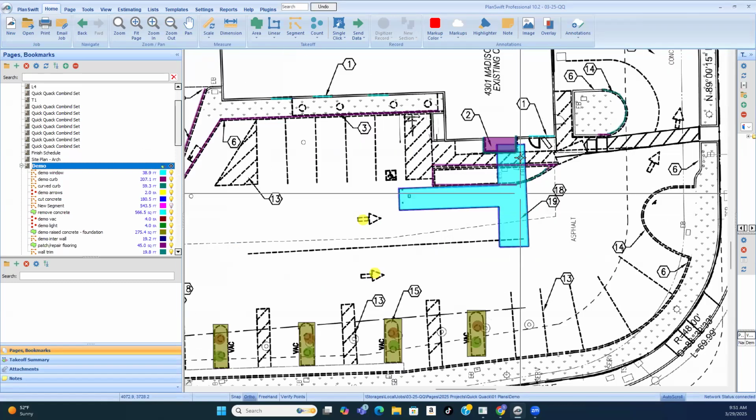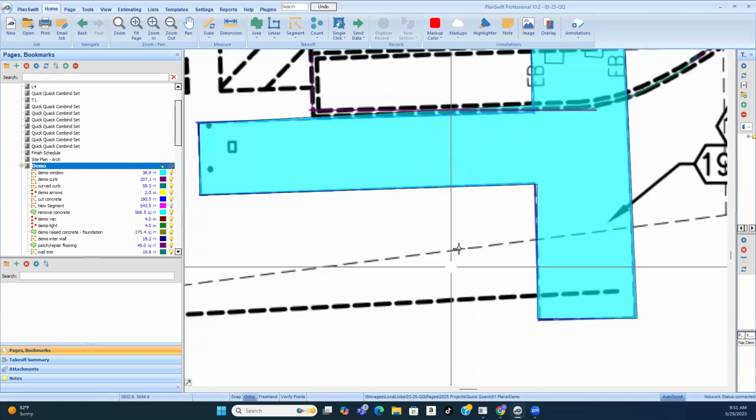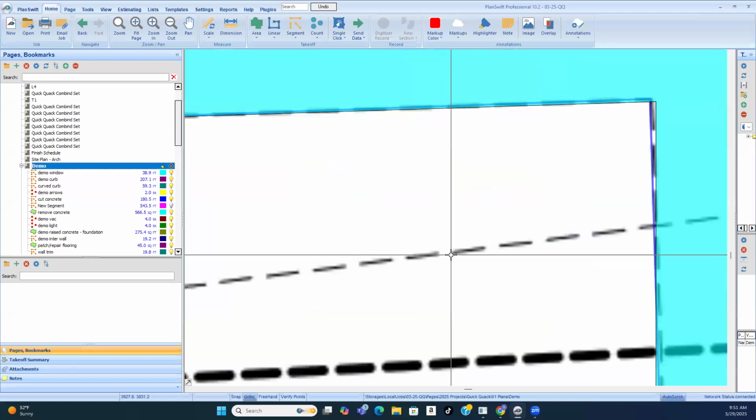So they're not showing us this much area because for a trench, you don't need that much. The size of the pipe is 1 inch, and for the largest pipes, we say give it 12 inches on each side, but not for a 1 inch pipe. You might give it 6 inches on each side, just enough to get the bedding and the pipe down in there. You know what pipe you're talking about. But yeah, for sure.